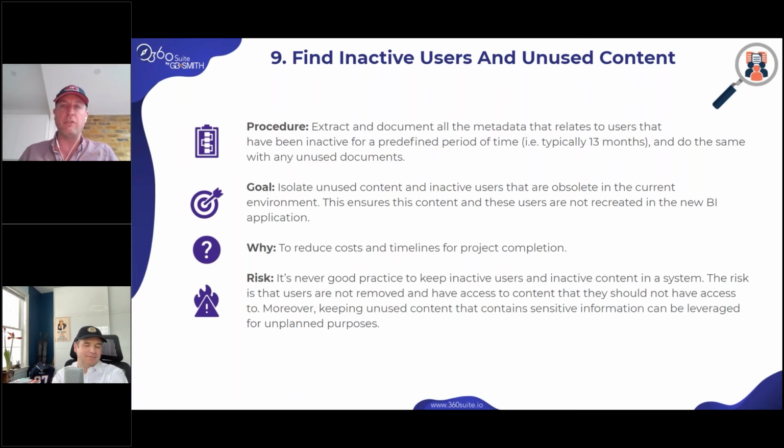So you'll have a lot of unused content for sure. Again, don't waste any time analyzing, asking users about rebuilding or testing if it's not required. So with 360, we talked about analyzing what's important. At the same time, thanks to usage, we can tell you what is not important. So you either prioritize or you just don't deal with the content at all.